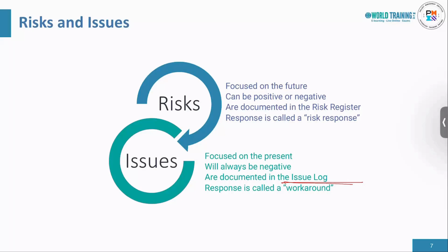It's also important to determine if issues occurred from an identified risk. If the source of an issue is tracked and known, project managers can determine the percentage of issues that were identified earlier at the risk stage. For issues not identified as risks, project managers can analyze how they were missed in the first place and if they merit inclusion in the risk identification process.